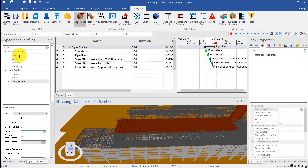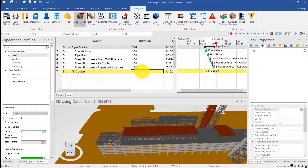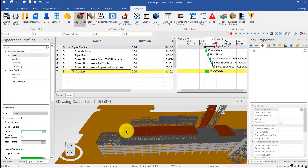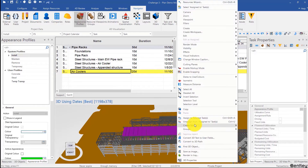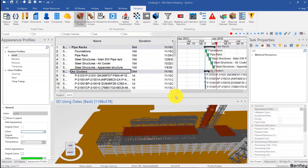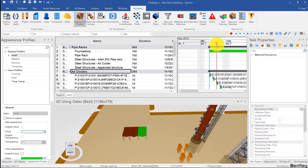For the air coolers, I'm going to use install, and then I'll create an activity called air coolers. Give that a 20-day duration, and then just click on those in the order I want them to be placed. Then right-click — first select the task of course — then right-click, create tasks under selected task, and yes. So now we can scrub through this and see that they're popping up in the order I want.